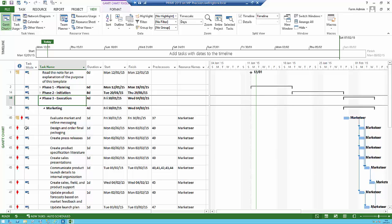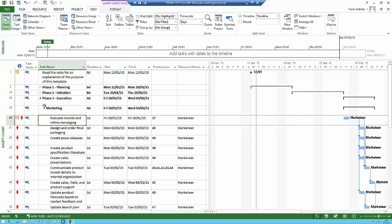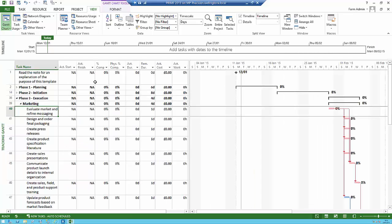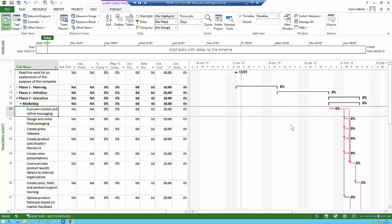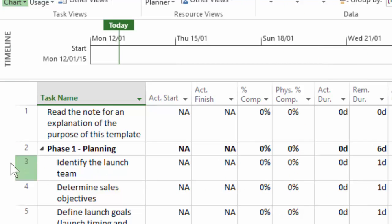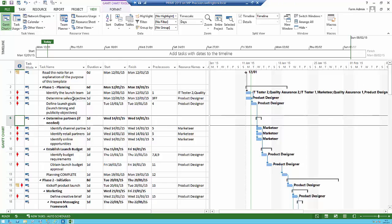Project comes with lots of different views, and those views have tables. For instance, you can see on the left-hand side that I'm looking at the Gantt chart view with the entry table. As you get more used to Project, you can right-click on the view on the left-hand side and change the view — for example, to the tracking Gantt when updating completed tasks, with the tracking table. All these views help you do different functionality, though you can just stay within the Gantt chart view with the entry table when getting started.